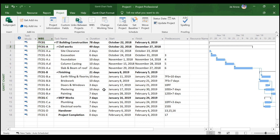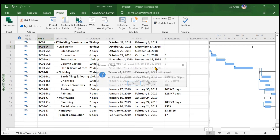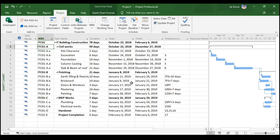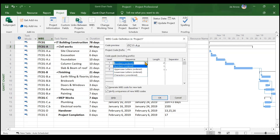If your changes are not visible, go to Renumber and renumber for the entire project. It will ask whether you want to apply the changes to the entire project — click Yes. You can also choose additional spacing options within the WBS settings.